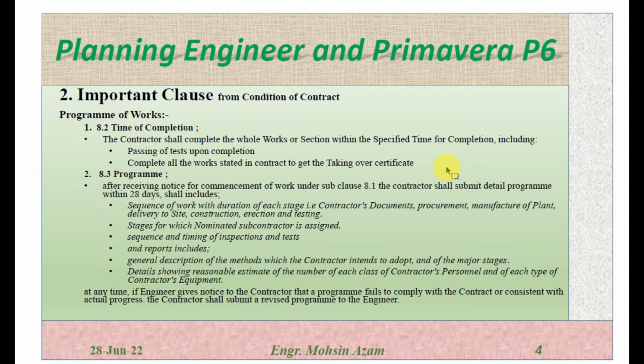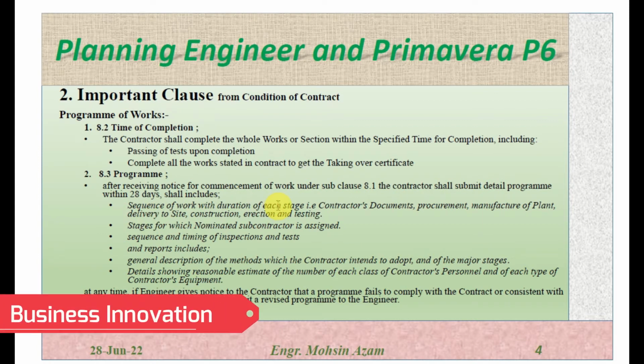After this, 8.3 is actually the program. What is the program? This clause is related to the program, which is actually the most important part of our job as planning engineers. After receiving notice for the commencement of work under 8.1, as we discussed, the contractor shall submit a detailed program within 28 days. So within 28 days after the commencement date, the contractor should submit the program of works.